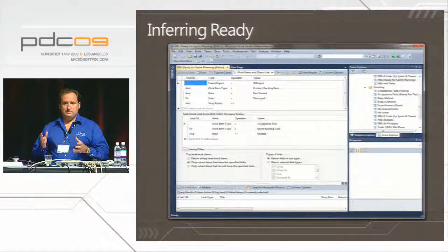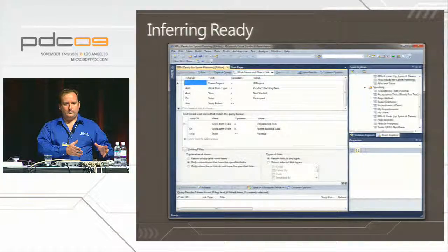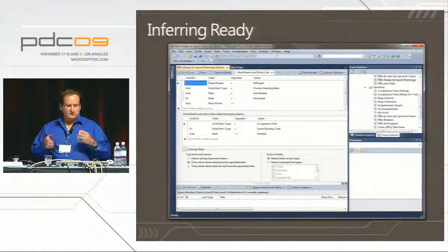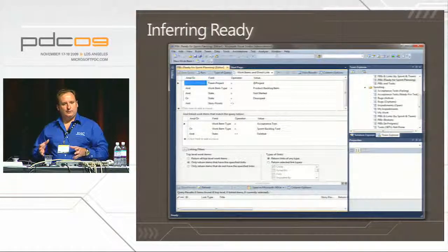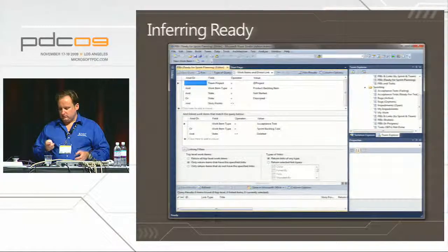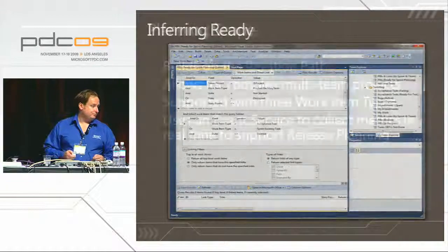And you set up a very simple rule which says, when we do sprint planning, we don't go to your master backlog, we go to the ready backlog. And it's a great strength of 2010 that you can actually sit there and go, yeah, we're going to look at this stuff. We're actually not going to take stuff. I mean, it's obviously not a guarantee, but it gets you a lot further. It means that you have to have actually planned, sensible work, and it helps you manage the pre-sprint planning workflow of getting stuff into that backlog. So that's one of the great things you can do with the named link types.